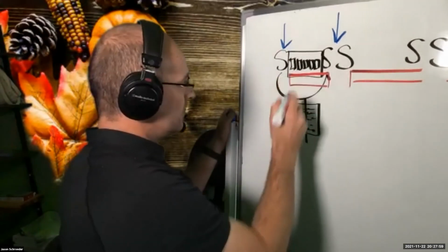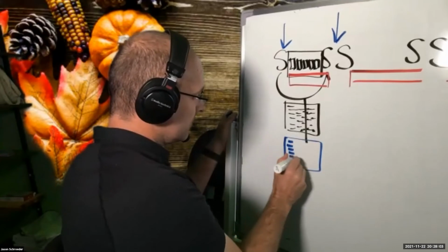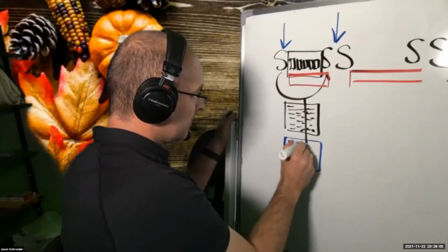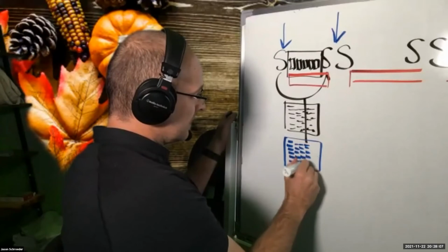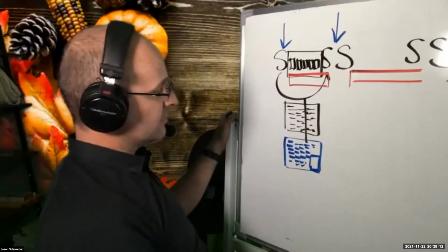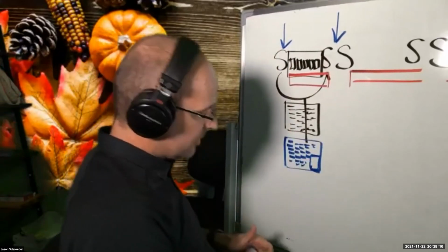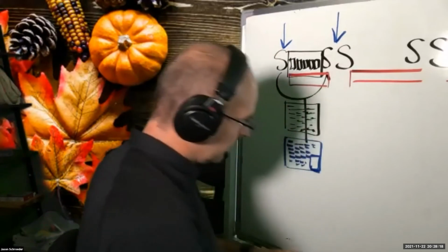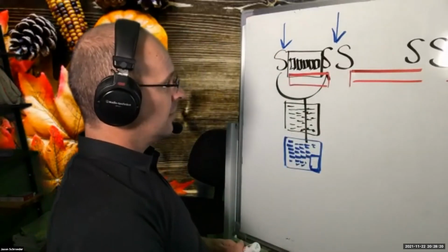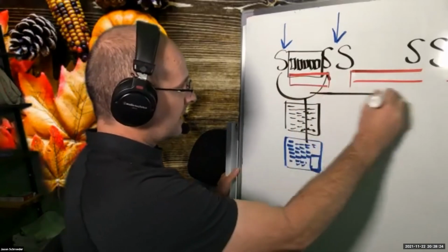And if you're going to do that, you have to have Takt wagons that are not packed full, meaning you have to have buffers in here, like maybe even half a day on Friday, that can absorb some variation, so that you can stay between the Sunday and Saturday. So when people don't make it work with Takt, I usually see them doing this, where they want a 5-day Takt time between the weekends, and they start getting out of rhythm.